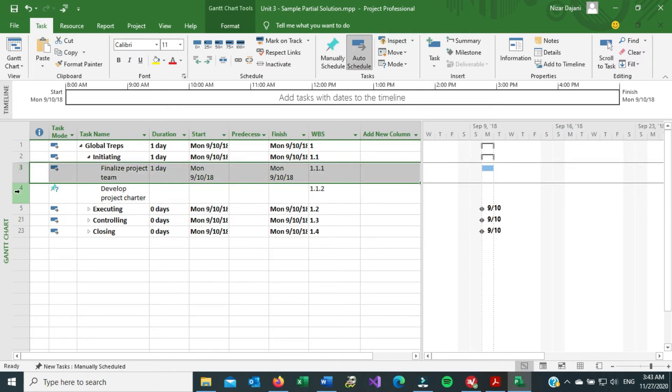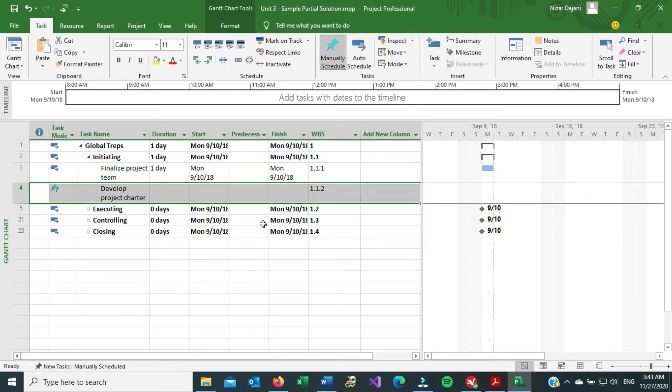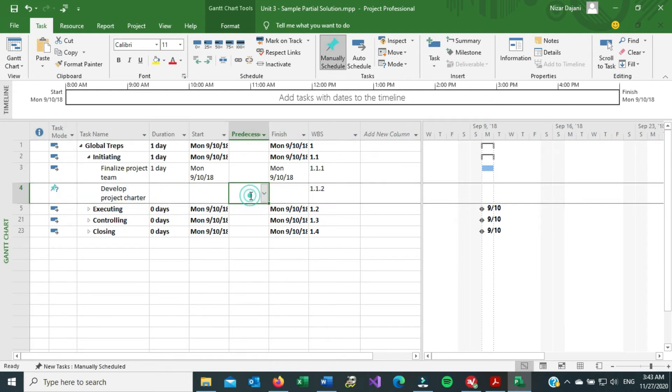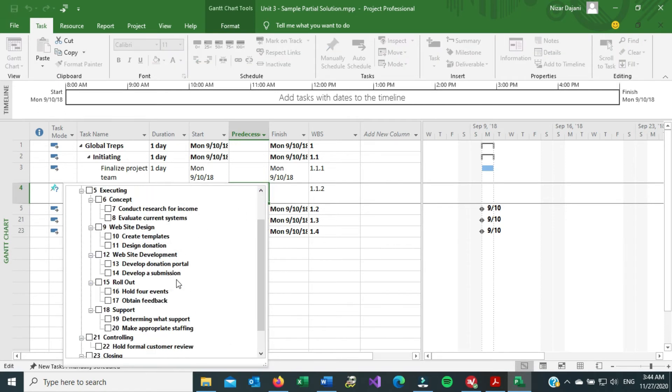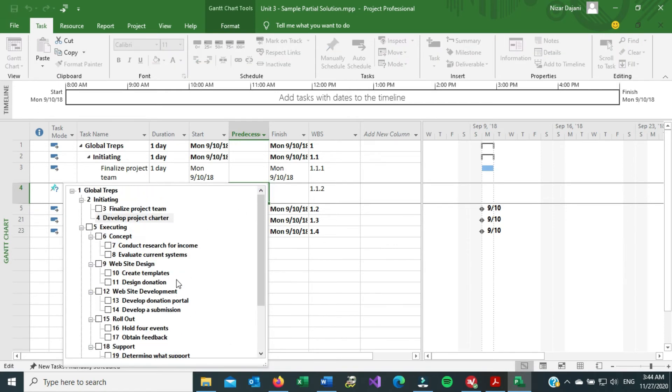So the way to add it is basically go to your predecessor column in the right task line, click on it, you're going to get a pull down menu. If you click on it, you're going to get a list of all the tasks that you have currently in your project.